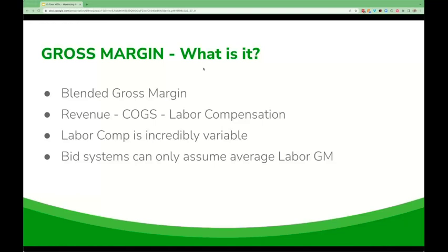So again, if your average technician wage is about $30 an hour, you're going to input the cost for labor as 60 and your sell price at 120 to 150 per hour. And look, if your market can sustain a higher number, more is better. That's where we want to start to talk about our blended gross margin.